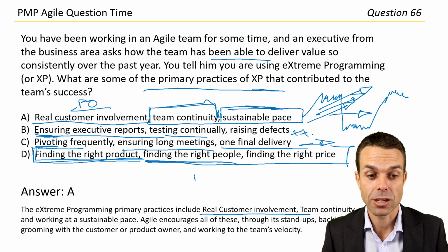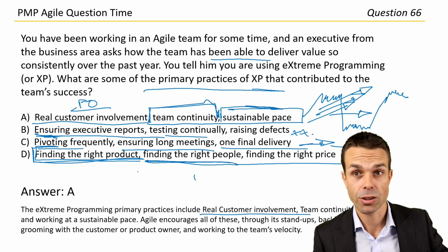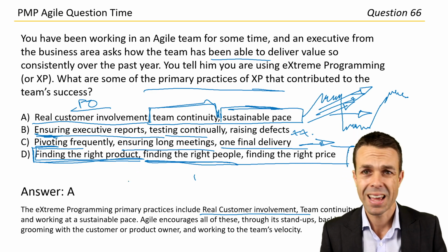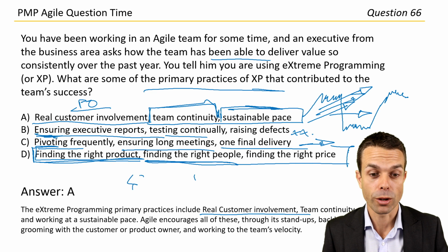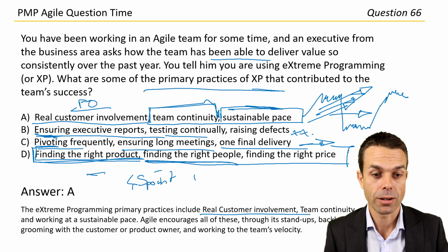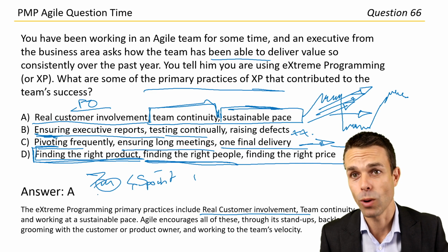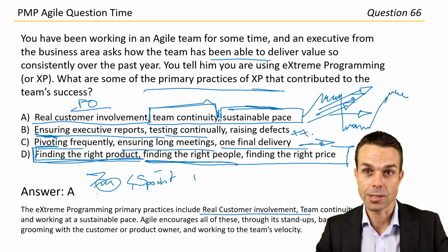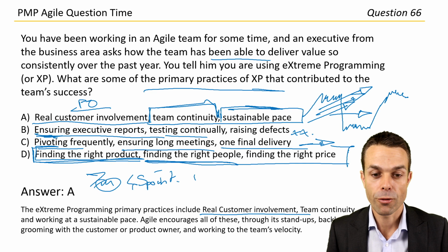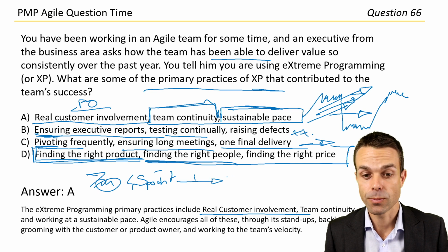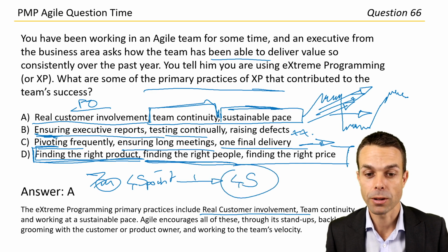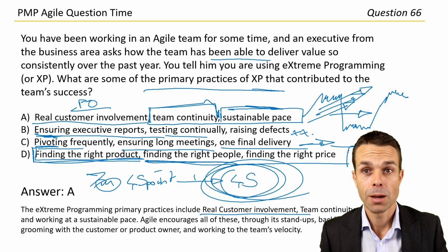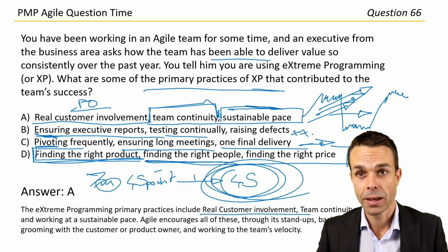So each iteration, we're going to say, look, the team has completed in the last 3 months or the last 3 iterations, on average, 45 points, or 7 medium cards, for example, or however you're measuring your cards, it's up to you as a team. And so if we're planning the next iteration, we're going to say, let's try and keep it around that same number of points because we don't want to overburden the team.